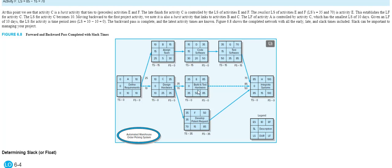But notice C, E, and H all have 0s. That means 0 float, 0 slack. That means these activities cannot be delayed, and if they are, the overall project is delayed.